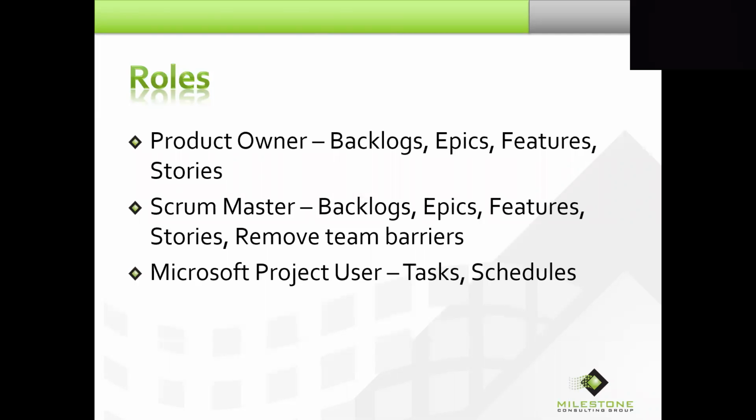In, for example, Project Server 2010, that was all done in PWA, so you would never even have to go to Project Professional. With Project Server 2016, you do have to check that checkbox, and it's only available in Project Professional. Otherwise, everything can be done in PWA.